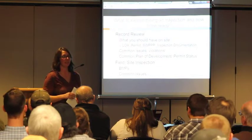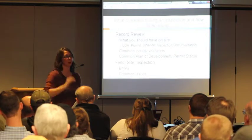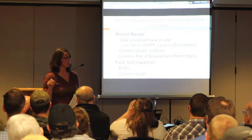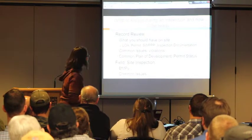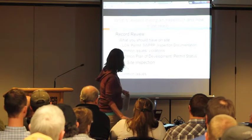Don't put that termination date as the day that you end work, because if you do that, you're not going to have that site probably stabilized and you're going to be discharging without a permit. So you don't want to do that. And I think Barb's going to talk about that when she talks about terminations.